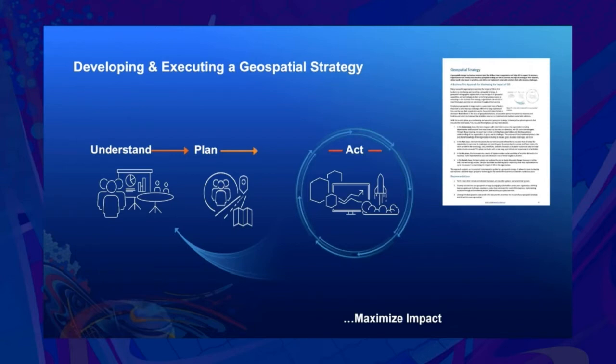In planning, you make the jump from how the technology can alleviate these challenges. For Mark and I, when we manage GIS environments within Esri, we're consistently engaging with our stakeholders every few weeks to ensure that what we have planned for both their current state and the future state continues to address their needs. Once you have this list of prioritized solutions, you're ready to act. From here, you can move forward incrementally, which means preparing for the solutions, which is notifying users, defining what the solution is, and then implementation where you build and train users. Finally, you monitor and support the solution deployed and review if it's meeting stakeholders' needs.